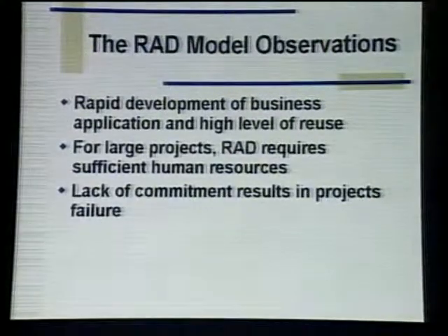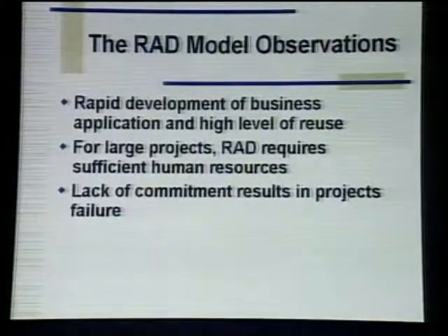Another observation about the RAD model is that lack of commitment results in project failure. When you want to develop an application quickly, a lot of resources are required, the human resources and the other computing resources. If the management is not committed to provide those resources, of course, you will not be able to complete the project within time, and hence the failure of the project will result.